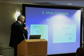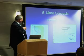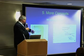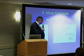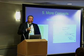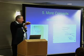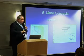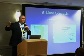Here's another view of Microsoft Project. I'm not actually selling that, but it is a basic software product that you can go out and buy. It costs probably a couple hundred dollars. On the right side there, you can't see too well, is what's called a Gantt chart. That's a visual representation of the timeline of each one of the items that you do. If you see little stars there, those are milestones, like orchestra hired, sets built, so you know that you've achieved certain milestones.